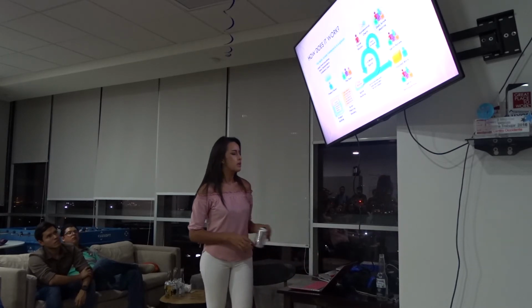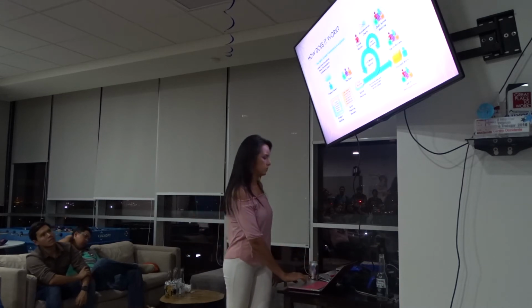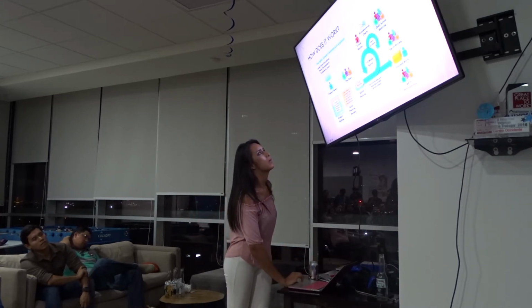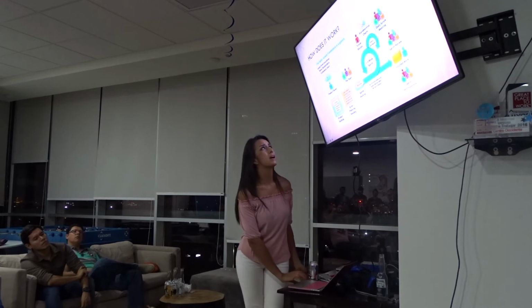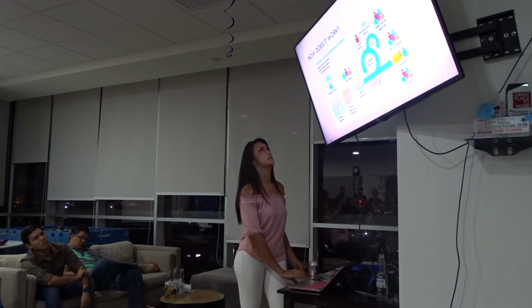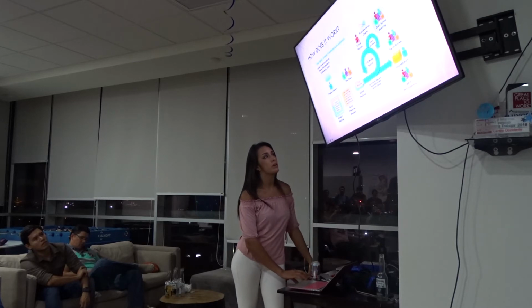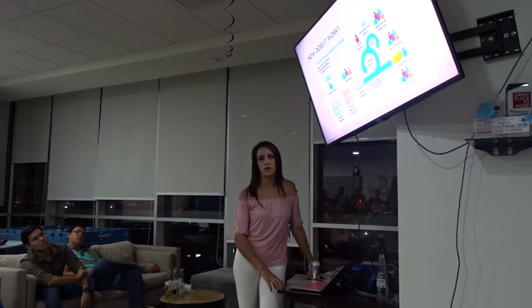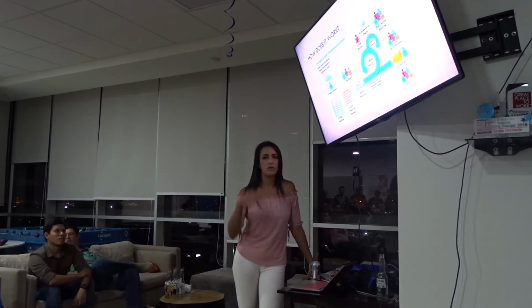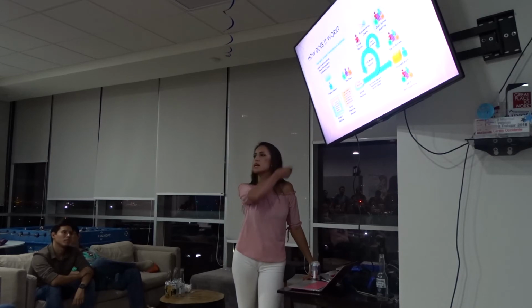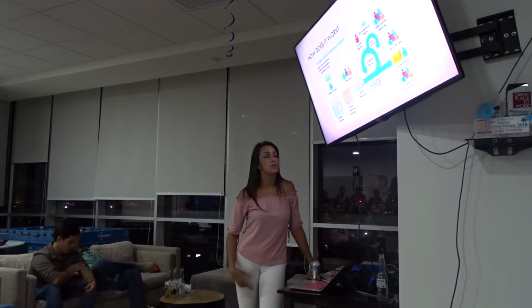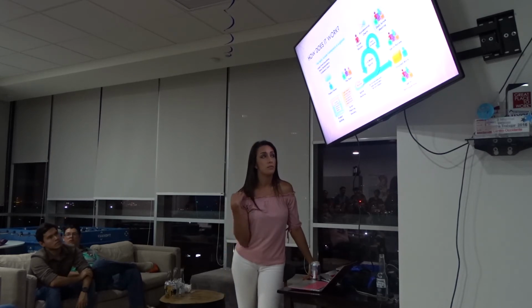As I mentioned earlier, it starts right here with the product owner. He has the inputs from the whole team, the stakeholders, customers, and users. Then he makes a list of the features, stories, tasks, or epics that we're going to be working on, and he ranks them by priority, which ones have more priority than others. That's considered the product backlog.